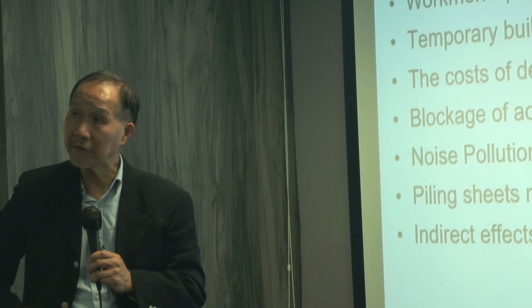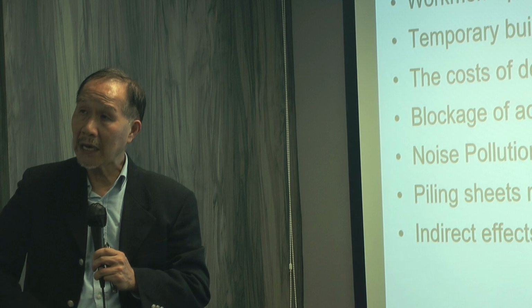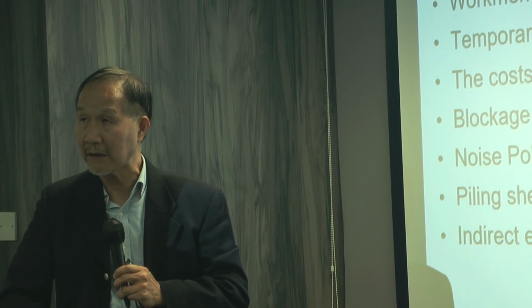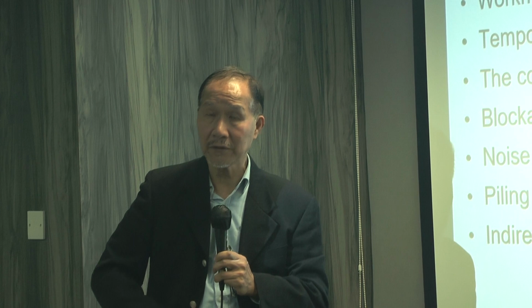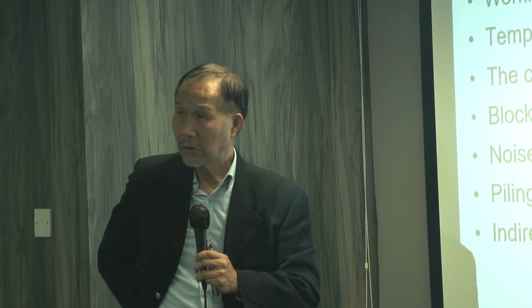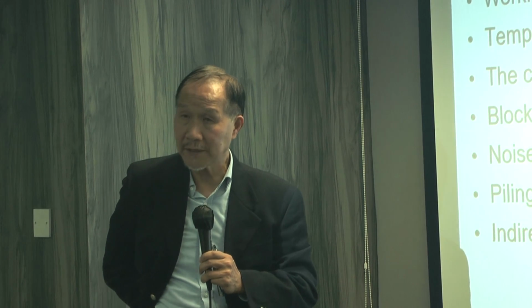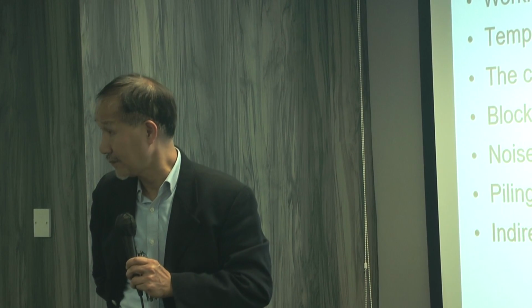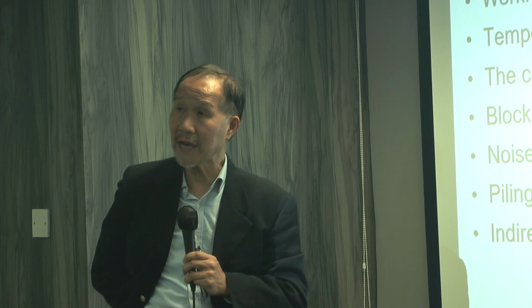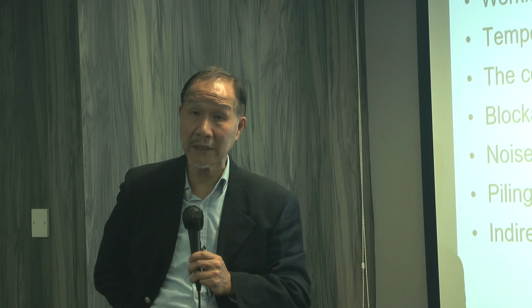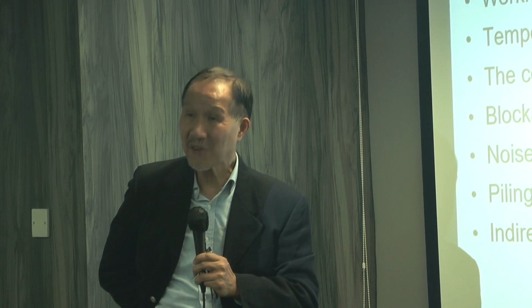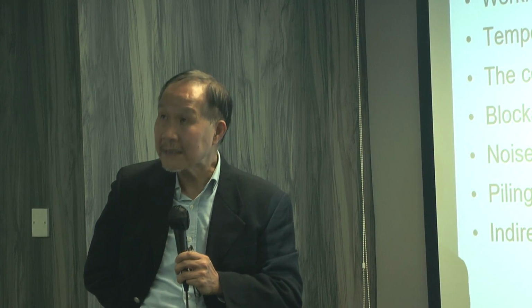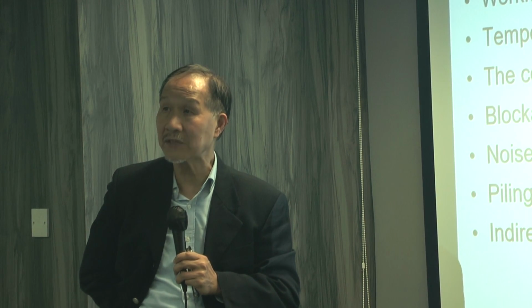If we build another new premises at Polytechnic, and in order to build the foundation, we happen to damage one of the cables supplying electricity to Tsim Sha Tsui East. So the whole area suffers a closure of business during the Easter holiday. It could be quite a big financial loss. But it's very difficult to prove that Tsim Sha Tsui East's downturn in business is solely due to this damage of the cable.